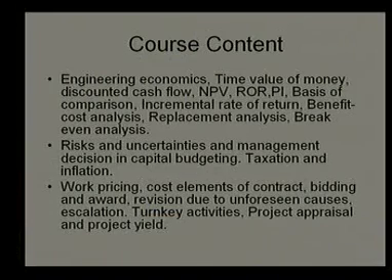Now, the second part of the course is related to risk analysis. You must be understanding that a construction project involves a lot of risks, right. What kind of risk you face if you start a construction project? There may be problem in getting the site itself. The project sites may not be clear, right. Lands may not be available to you, right. So, this is one risk. There could be failure of design, that could be another risk, right. Suppliers not meeting their commitment, that could be another risk, right.